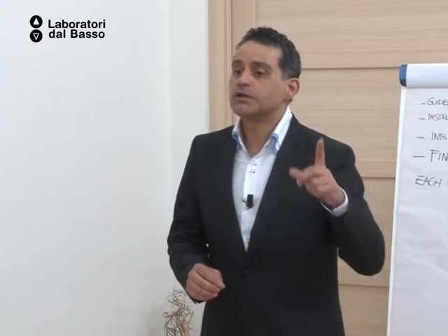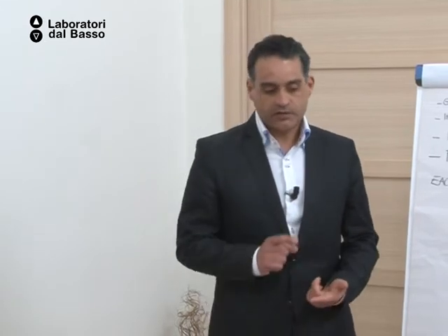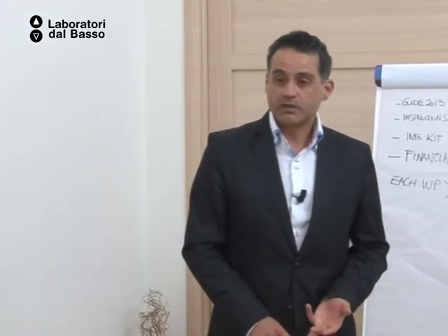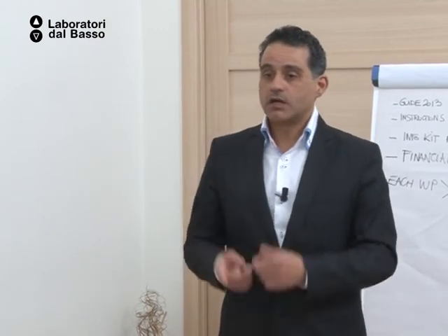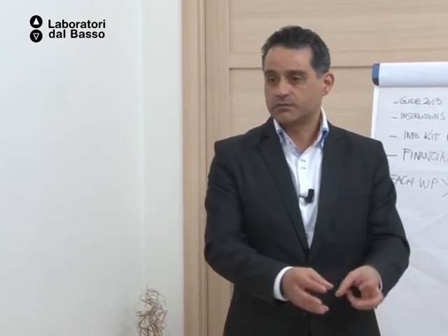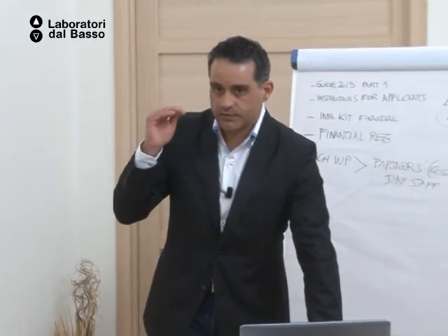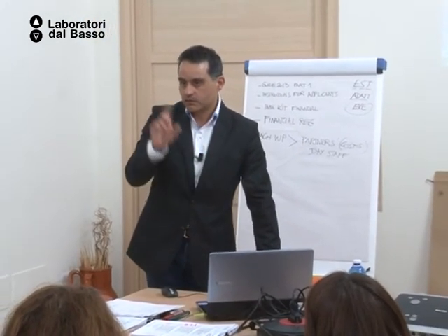By the way, you will learn also that when your project is approved, you get the money, you start the project, and you actually use the budget table to monitor the project. Okay? You will use it during the project to match what you are actually doing with what you have foreseen. You will see that. Then you have, as I mentioned, the staff costs, the subsistence and travel costs, the equipment, the subcontracting, and other costs. Other costs are the costs that you can't find a place to put. You will see that with the project that I have with me, a budget table all filled in.